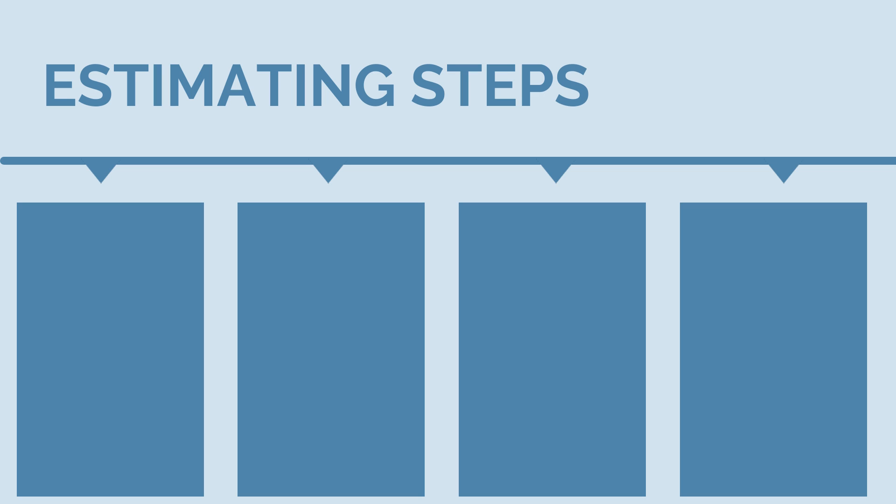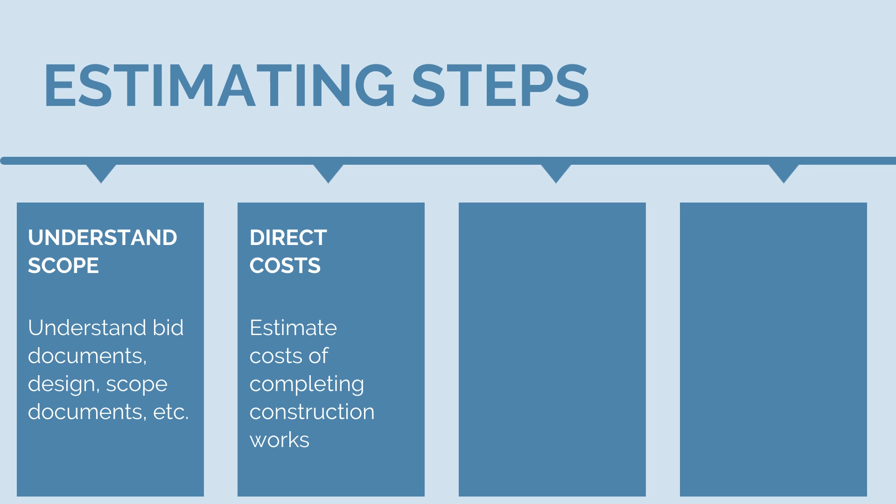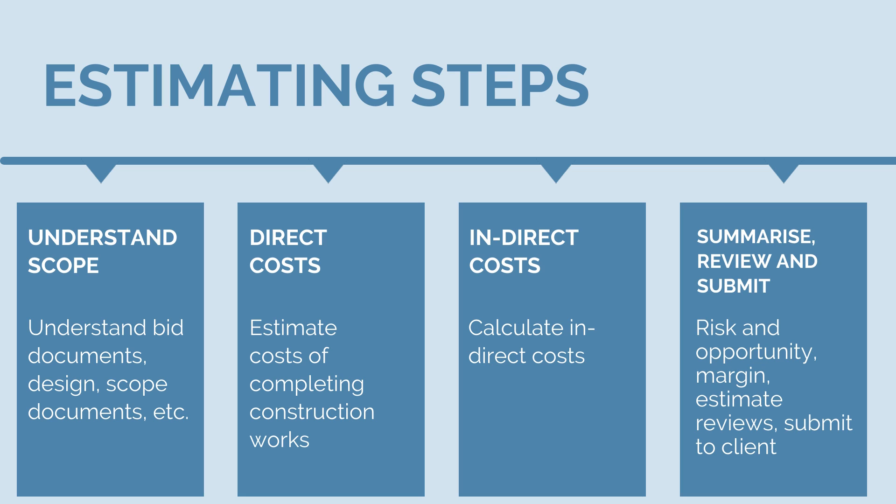Let's break this down into a series of logical steps. To estimate any project's costs, there are four basic steps. Step one is to understand the project scope — we'll need to review the design, specifications, tender documents and anything else provided to work out what we need to be doing. Next, we'll calculate direct costs: the costs of completing actual construction works. Then, once we know or roughly know our direct costs, we can work out our indirect costs. Steps two and three will occur iteratively. Then in step four, we'll need to summarise, review and submit our estimate.